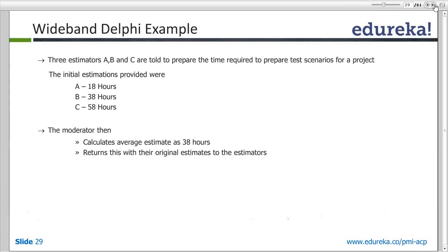And you would spend some effort then in collating them, that okay, if you are small, let me put it 1, and you would do that. So there should be one common estimation unit that you should be using. Okay, then comes individual preparation where you go back to your seats and decide and estimate each task. You add missing assumptions, and then the estimation session happens. Moderator shares the estimate so that estimators can see the range of the estimates, and then the group discussions happen. Then the tasks are assembled and the results are reviewed.